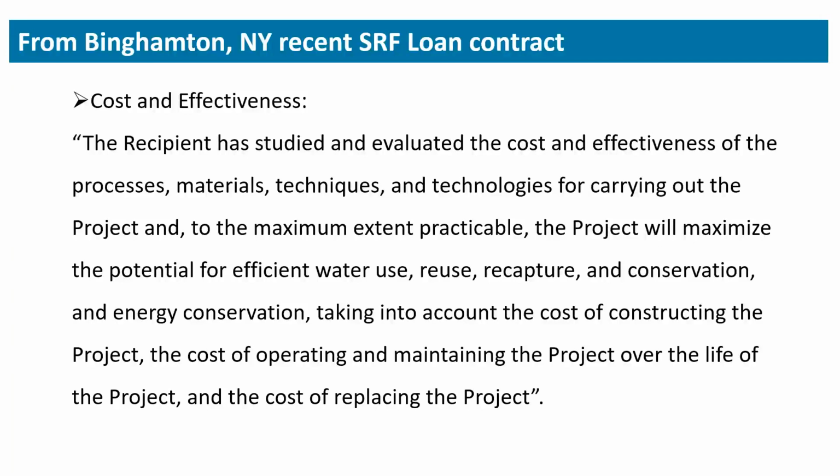I don't like to read slides, but I'm going to read this one. The recipient has studied and evaluated the cost and effectiveness of the processes, materials, techniques, and technologies for carrying out the project. And to the maximum extent practicable, the project will maximize the potential for efficient water use, reuse, recapture and conservation, and energy conservation, taking into account the cost of constructing the project, the cost of operating and maintaining the project over the life of the project, and the cost of replacing the project. Now, that's not just a statement, that's a covenant.